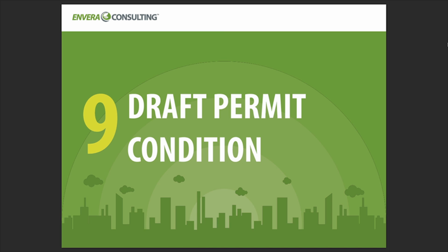Number 1, consider the points that you made when you went through your rule evaluation in section 6. If you state specific actions that you're going to do to ensure compliance with the rules you identified in section 6, then draft a permit condition to make the AQMD comfortable that, yes, this is what we're going to do and compliance will be achieved. If you're going to operate the equipment within a certain range of operating conditions, you want to note that. You can include set points, monitoring frequencies, and all that kind of stuff.